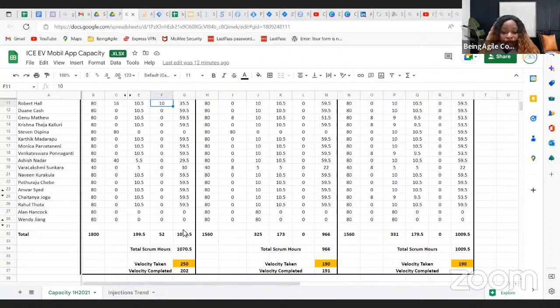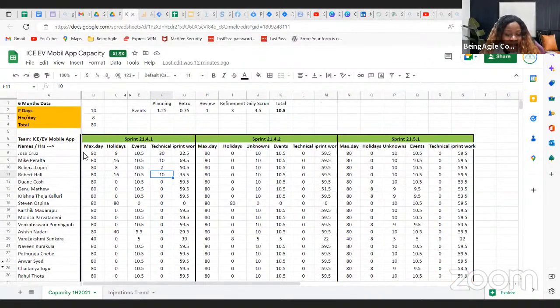But now at the individual level, we may see that we need someone, let's say, Jose. Jose has the skills to do most of the development work, and Jose is going to be out for the entire sprint. Clearly, we are lacking there. So that's the reason why it's important that we look at the capacity from two fronts, so that we ensure that at the end of the day, we still have all the skill set that is required to achieve a done increment at the end of the sprint with the capacity we have.